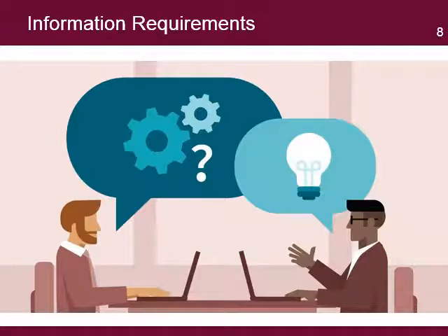After these requirements are gathered, they should be analyzed and compared to the project's current efforts. In particular, the project team should look for duplication of efforts, for example, multiple staff members citing responsibility for reporting identical information. They should also look for information requests that do not match a staff member's level of authority and obvious omissions in the project information needs.